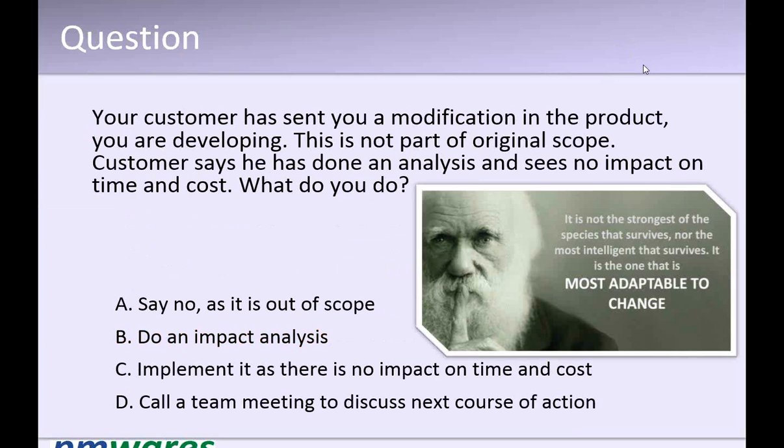So if the vendor is the expert, then who should do the impact analysis, and whose impact analysis will be right? Definitely the vendor. So the customer is not supposed to do the impact analysis. This is the job of the vendor.